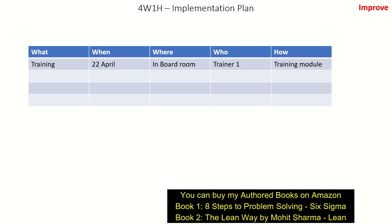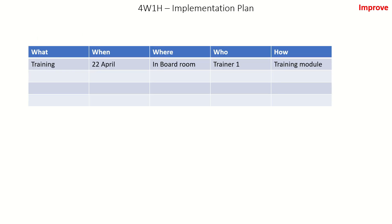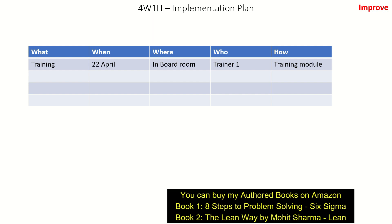The next thing the team has to do in the Improve phase is create an implementation plan. They can use the 4W and 1H tool: What is to be done? When is it to be done? Where is it to be done? Who will do it? And how? One example is the training to be provided to the associates — it has to be done on a particular date, in the training room, by Trainer 1, using a training module that has been created covering what will be taught on day 1, day 2, and so on.